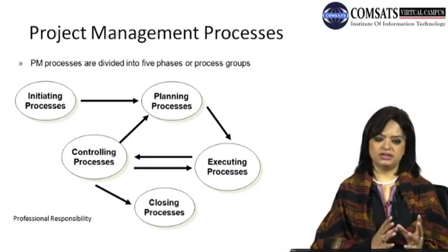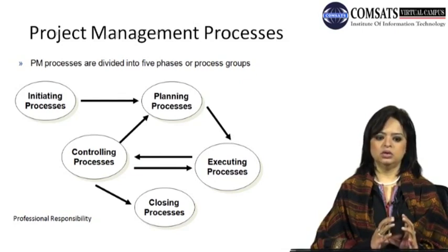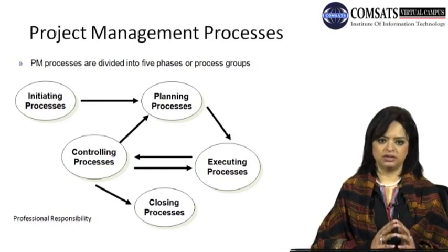The initiation process is all of the information coming in from the customer, minimum resources provided by the project organization, minimal only to get all of the information that the customer can provide, put it all together in one space or one document, have a common understanding between the customer and the project organization, and do a quick sign-off of a document which is called the charter document.